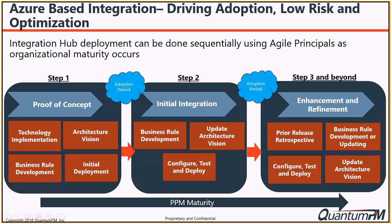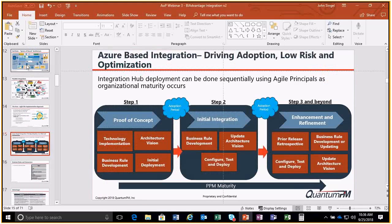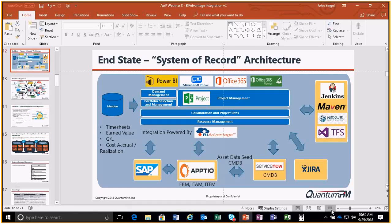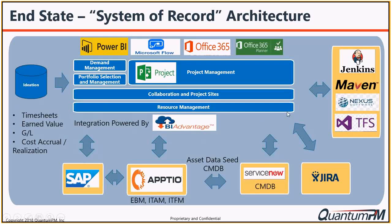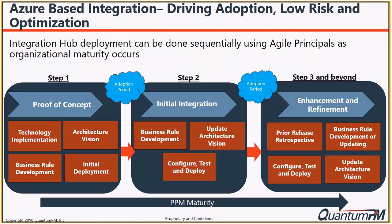Phase one would be a POC. Usually it would focus on getting the technology in place — bring in BI Advantage, get the Azure-based integration hub worked out, and identify the connectors we're going to use. Architecture vision is critical: you need to figure out what the picture is going to look like, what systems are going to do what, what's the ownership of data, what the layers of integration would be, and the business rules associated with this eventual vision — all aligned with corporate strategy.